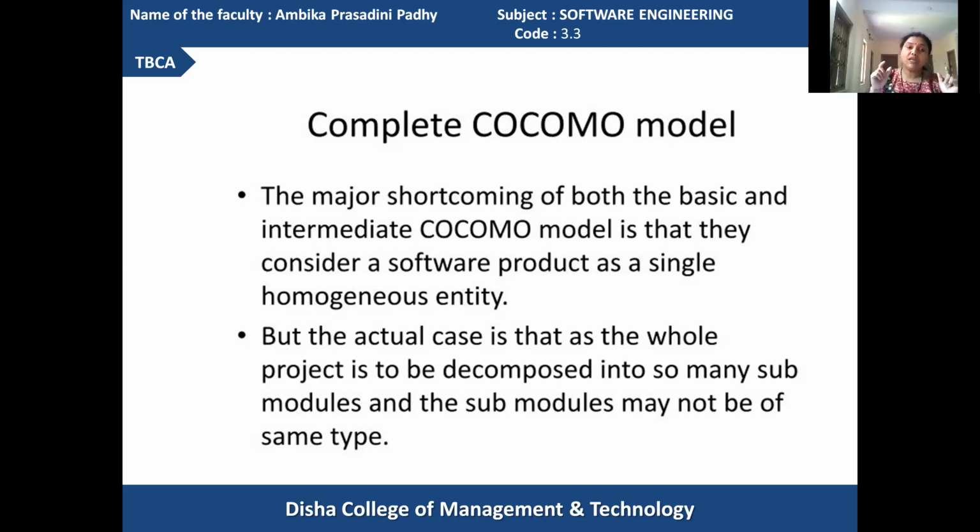According to the requirements identified, the main module is first identified, then the main module is separated into sub-modules, and each and every sub-module will have its smaller level functions identified, and according to the smaller level functions, the modules are derived from the sub-modules, and the smaller modules provide more accurate results to be calculated for the product development part.